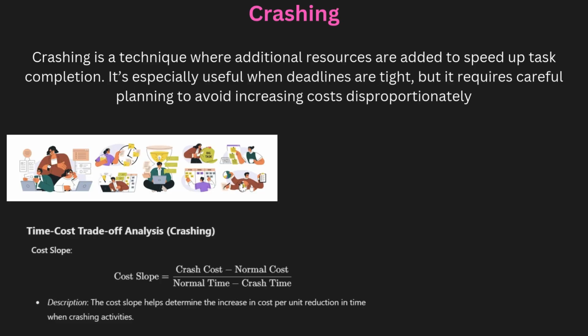So now, crashing. Crashing is a technique used in project management to reduce the duration of a project by increasing the resources on critical tasks. This method is typically applied when the deadline is tight or when the project is behind schedule. Crashing involves adding more manpower, equipment, or working overtime on critical tasks to speed up their completion.